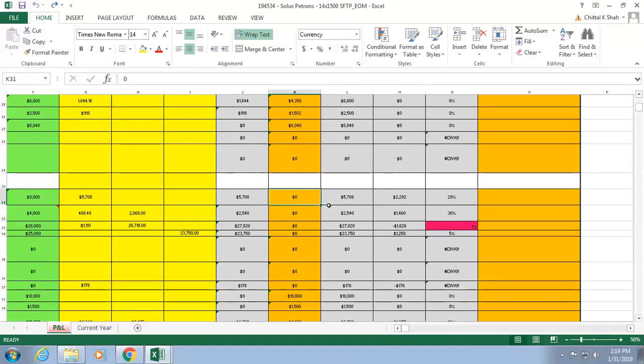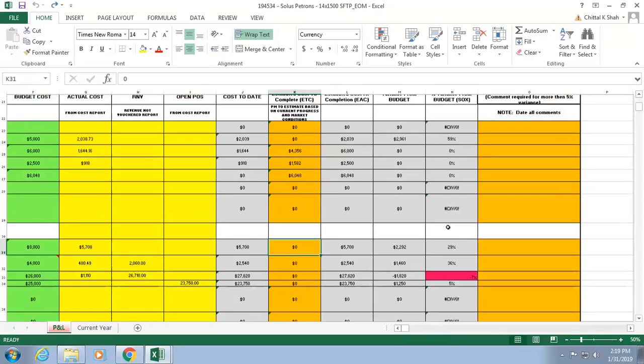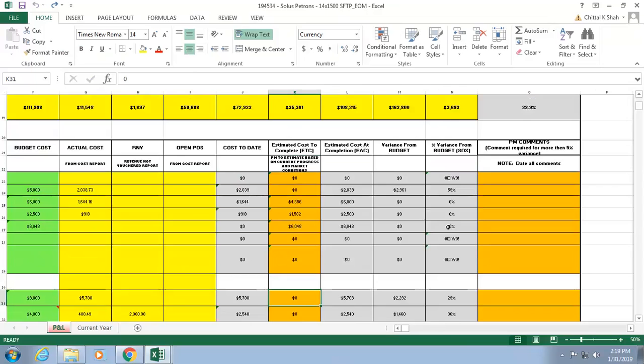Now sometimes you're going to have some budget left on this bucket because you're done turnkey over here. So in this particular case, things were done turnkey on forging, but the budget was in machining. So the machining got lower where forging got higher, right? But you can explain that. You have to explain that in your comments, saying this is what went on. I had to do some turnkey work, which is charged to the forging task. So the machining is going to be lower where the forging is going to be high. So every month you want to do that. And the reason for doing that is you want to track it so that you don't go completely over budget, or if course correction is needed, you can do that course correction.